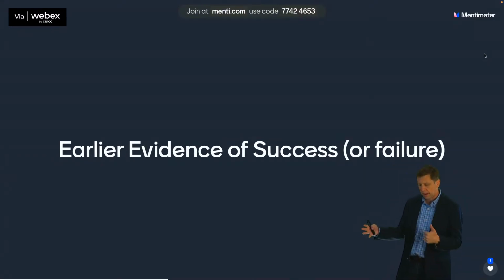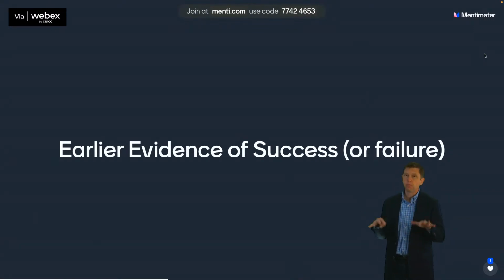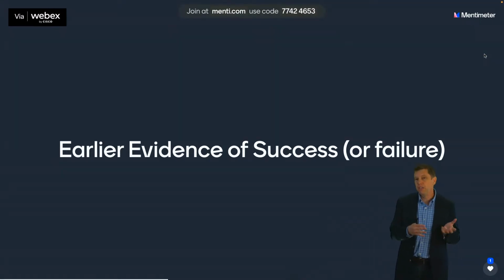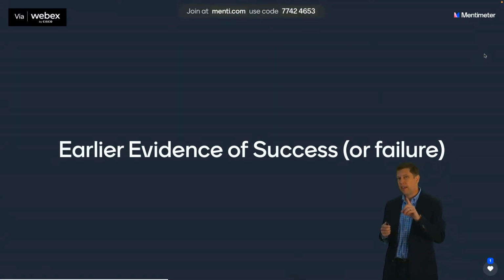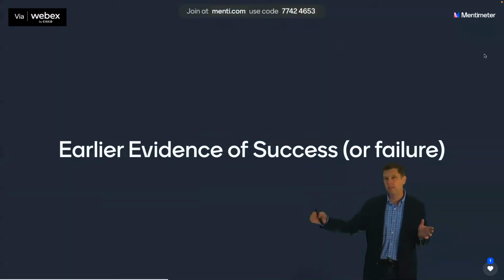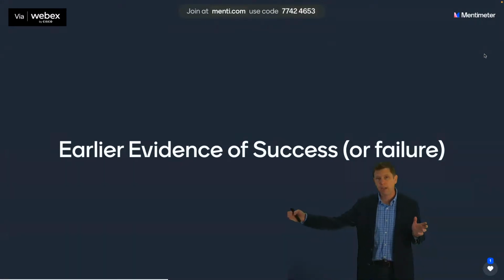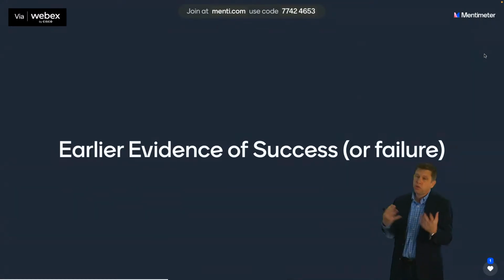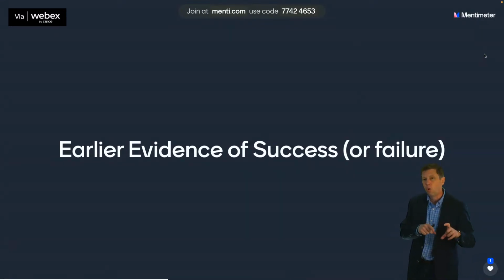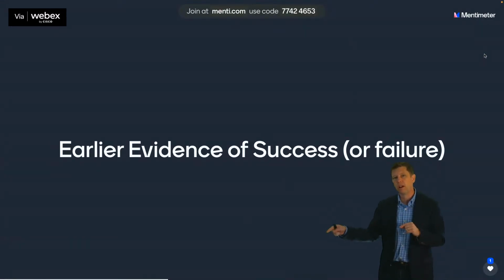So let's say they expect it to take 3 years, and for some reason, this foundational work is mapped out to take a year. Well, that means you're not really going to have any evidence that anything can be produced till at the end of that year, and even beyond that, right? So with the MVP approach, you've got to actually figure out and say, how do I build just enough of the runway that I need, just enough of the foundation that we need in order to go ahead and deliver something through to the customer?